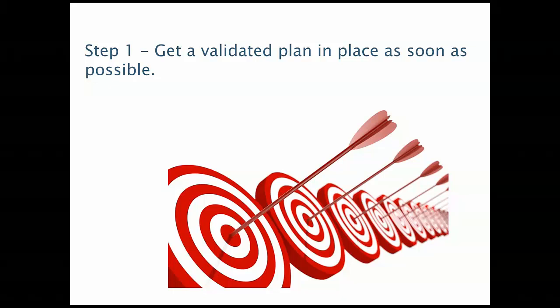And the third part about that phase of the project, it's usually when most issues could be resolved much easier because the relationships in a project are usually the best at the very beginning. People are much more willing to cooperate at the beginning of the project. And in fact, typically, the further you go down the project, the more difficult it is to resolve issues. Plus, you have more opportunities to resolve issues early in the project. When delays occur, you have more opportunities to really look down the critical path of the project and say, we could make that time up right here. The earlier you address it, the more opportunities you have.